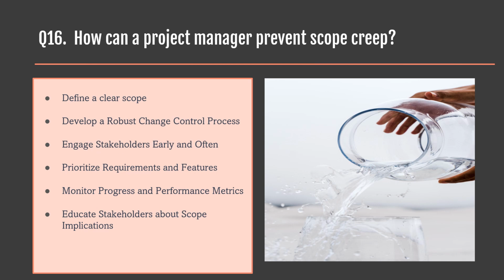Mary used a project management tool to monitor the app's development progress and compared it to the original scope statement. When the payment gateway feature was requested, she addressed it through the change control process and included it in the later versions. She also explained the development complexities and the impact on the project timeline and budget for inclusion of payment gateway feature to Jane and allowed her to make an informed choice.